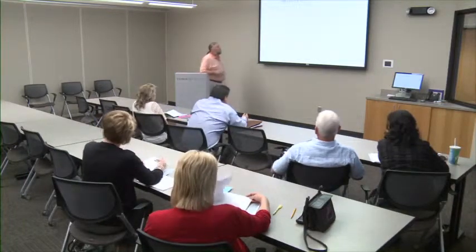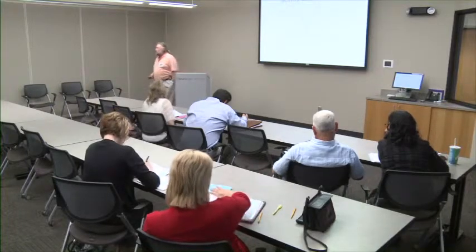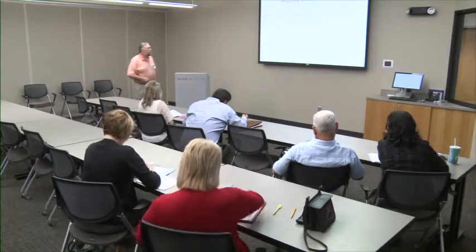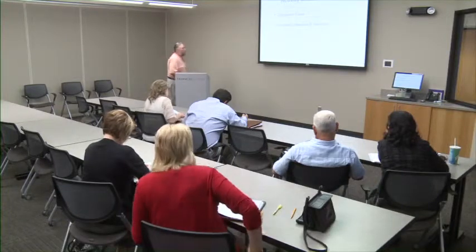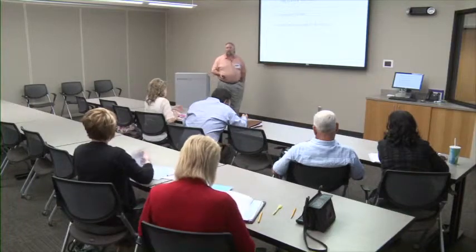All right, let's talk a little bit about activity characteristics. We talked about having these activities. Well, what are these activities? Well, one, they consume time. So if it doesn't consume time, it's not an activity. Okay? They usually consume resources. Our activities involve us having to use something. We're laying sod, we're moving dirt, we're building bridge foundations, so we're consuming resources.